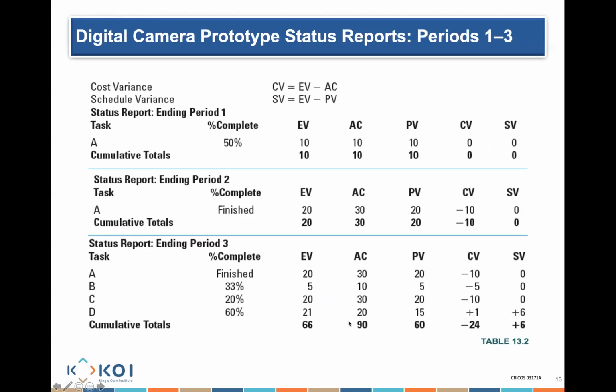We already gave you the actual cost. So all you need to do is make earned minus actual cost and earned minus planned for every single item. And now we'll give you a total of all of these various items, and that basically gives you the accumulation of what is really happening.